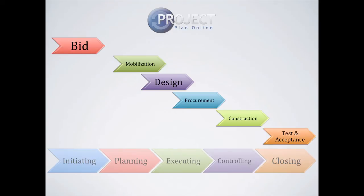We'll take a typical EPC, or design and build project, where you bid the work, design and construct the project. So initially you would have the bid phase, where you bid the work and win the project. You're probably then going to have a gap between bidding the work, winning the work, and mobilizing the project. And as we move down through the project, you'll see that I've shown overlaps between mobilization, design, and procurement, because in reality that's how it's going to happen.